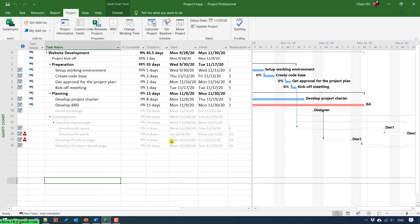I think that's all. After you finish this video, you know how to work with inactive tasks in Microsoft Project. Sometimes when we don't have enough resources, or when the requirement is not clear for some specific tasks, we can disable it temporarily. And then next time when we have enough information or more resources, we can enable it back. Thank you for watching — bye bye, see you in the next video!